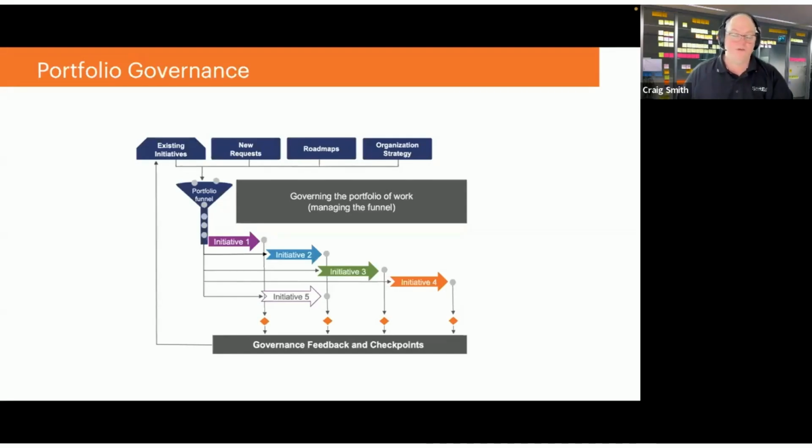And when we start to do that, it means we can make decisions, because if something like initiative 5 comes along, we can then stop and go, hey, we don't have the time to do both 2 and 5. We made a decision to pause 2 because we've delivered some value already in 1, work on 5, and then re-pick up 2, 3, and 4 at a later date. Simplified example, but you can make better decisions when you've broken things down.